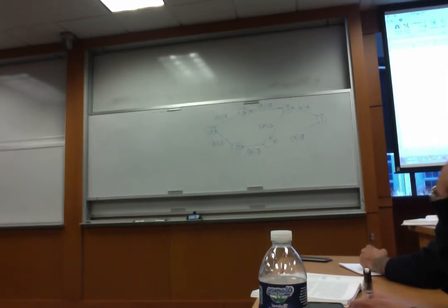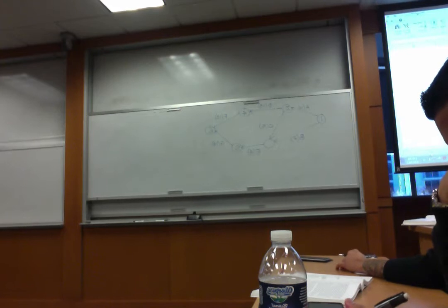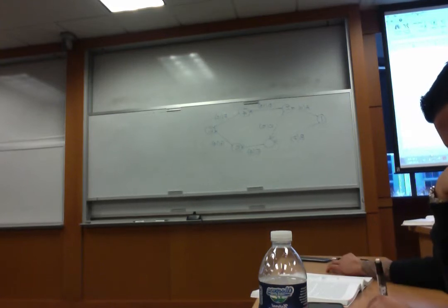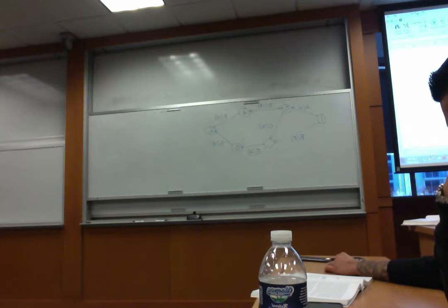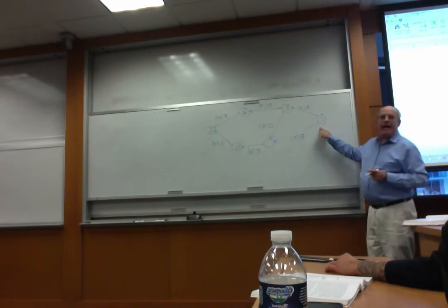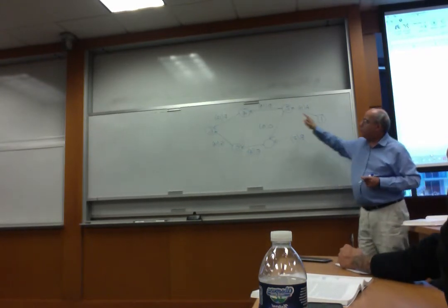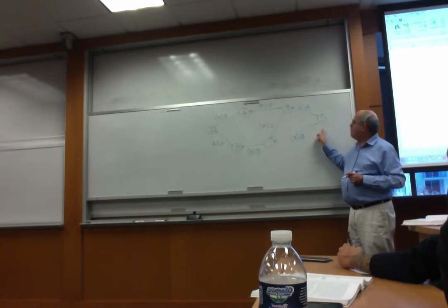But then I'm going to show you a more mathematical, scientific method that works for any project, even if you have thousands of activities. Right now, for a small project like this, we can cheat. We can find out how long it's going to take by enumerating all possible paths. What constitutes a path? It's very easy to see. A path is a walk from 1 to 6. So how many different ways do we have to walk from 1 to 6?